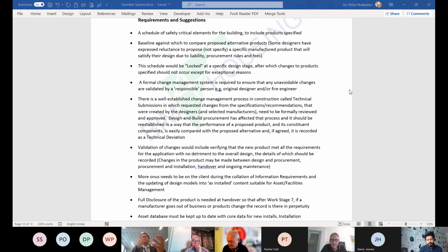But when it comes down to procurement, that's when the guys come on board as a builder, so we'll take a contract on as design and build. So we're looking at the risk of the project. We'll bring a sprinkler contractor on in the procurement process, sometimes via an MEP main contractor underneath of us, and sometimes direct, depending on the type of job or the complications.